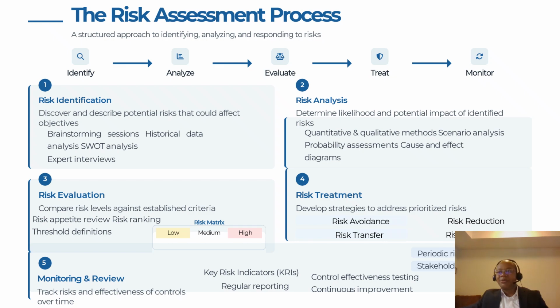So first and foremost, like we discussed in previous lessons, risk identification, there are different tools and techniques we can use, such as brainstorming sessions, historical data analysis, SWOT analysis, expert interviews.